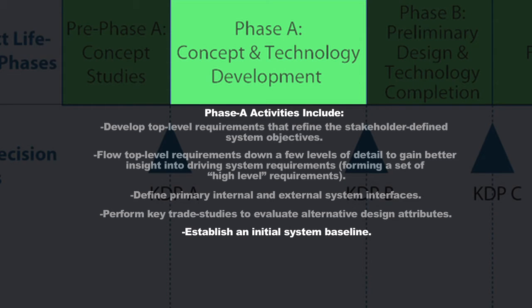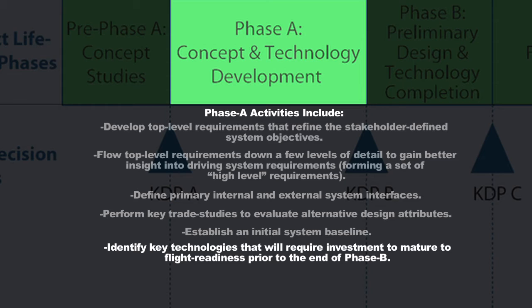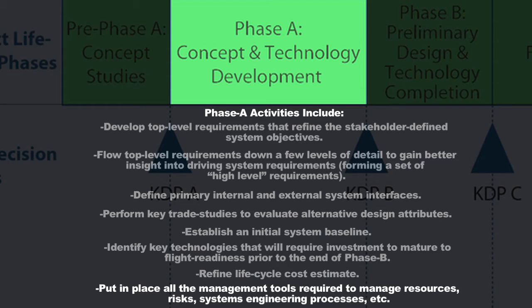You're also going to establish an initial system baseline, identify any key technologies that will require investment during Phases A and B to ensure they're ready for implementation, and refine your life cycle cost estimates so stakeholders understand the estimated total cost to complete the entire life cycle. You're going to put in place all your management tools to manage all your resources — money and schedule, as well as technical resources like power and mass, which you only have a certain amount of to allocate across the development team.